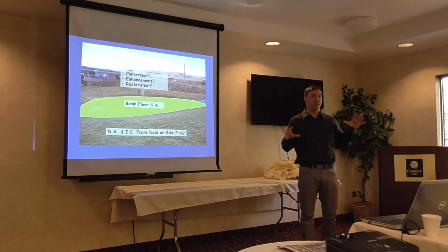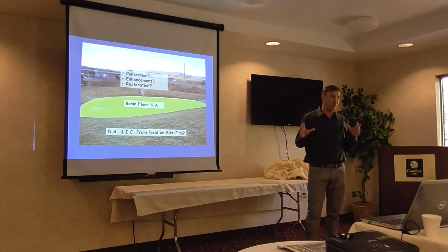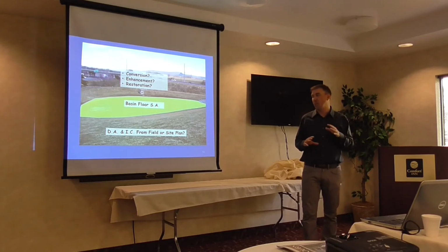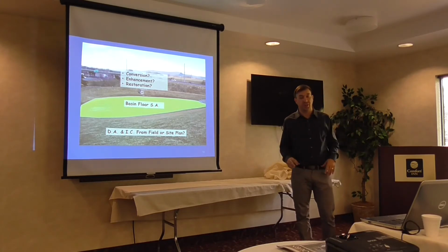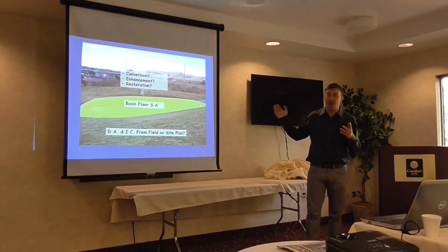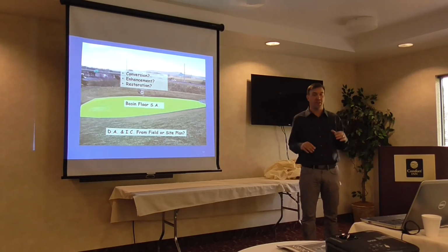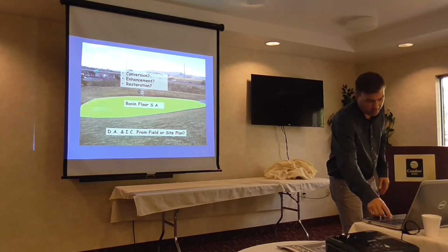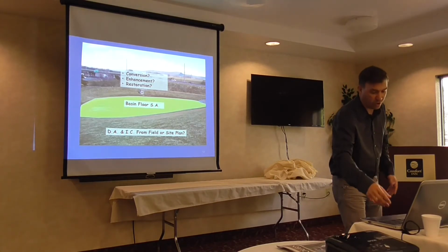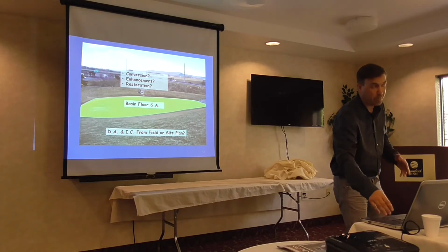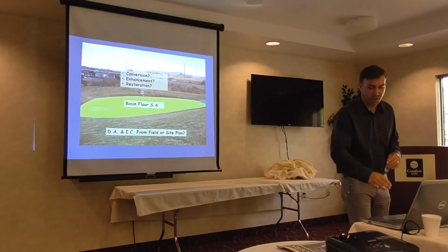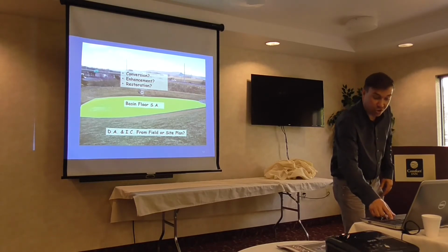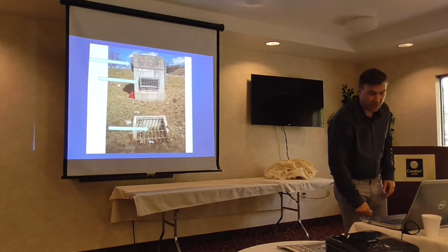So somewhere along that construction process, something got rerouted, something didn't get installed properly, and so it's not necessarily getting there. Or it could be conversely, maybe you have a lot of overland flow that's getting there from other areas that are not identified in the plan, or there's been some different development that's occurred over time. But if you can get a hold of the site plan and do some field verification, that's going to help you make sure you understand what that drainage area is.